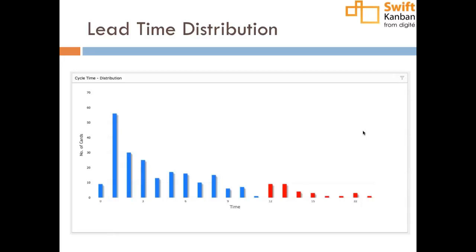That extra large card is sitting in a work queue. Somebody is working on it, which means that he's missed 5 simple cards to work on. Correct. That is where the flow becomes turbulent. I mean, one car stalled on the freeway and the freeway backs up, right? Correct. Absolutely. Great example. And that is why breaking cards into things that the system can handle smoothly.